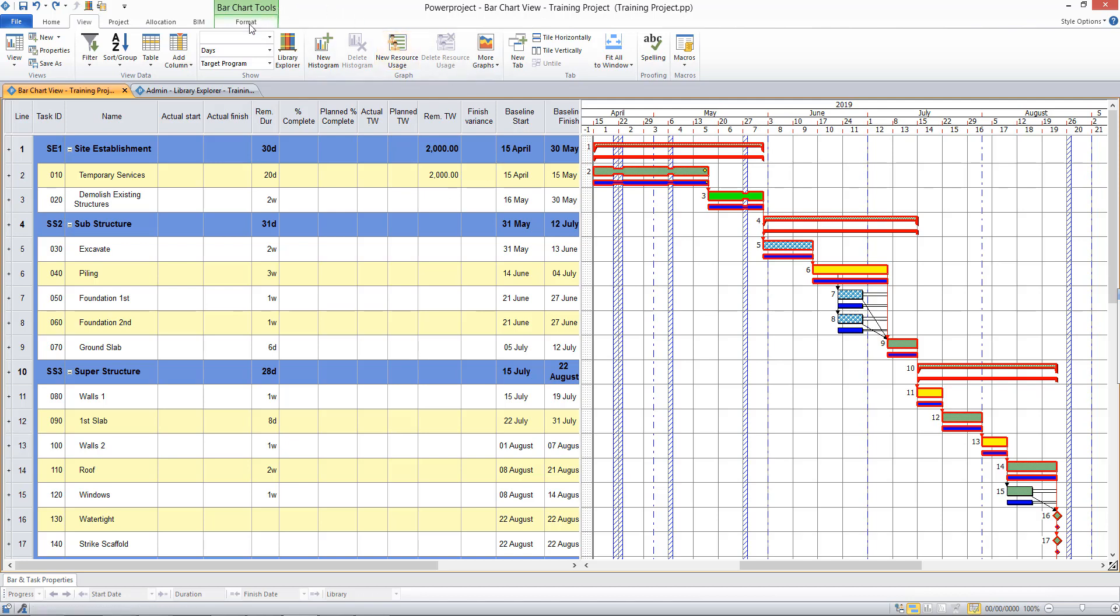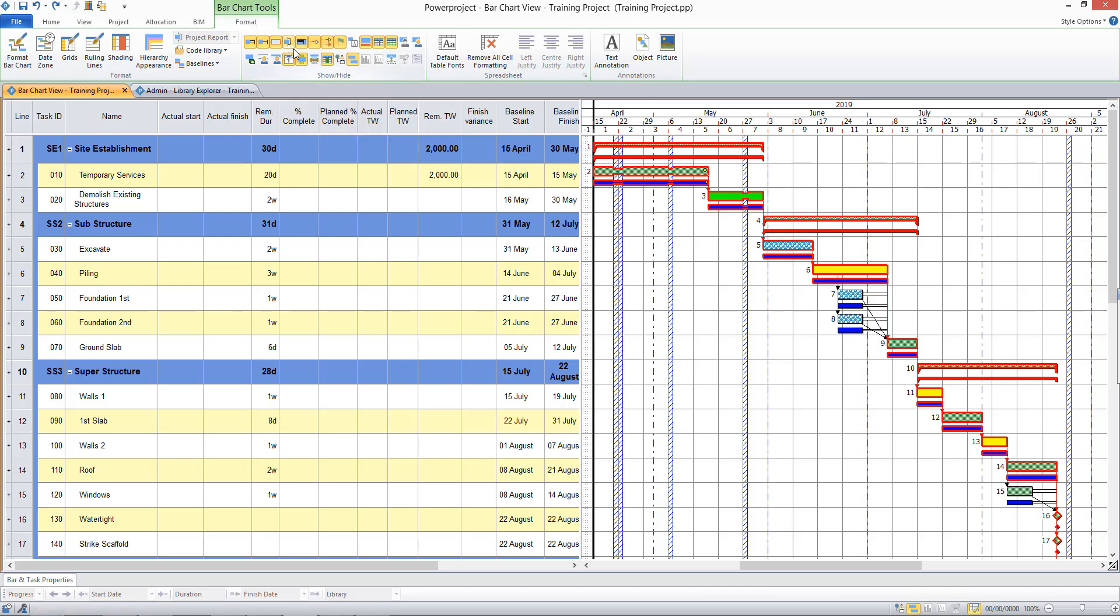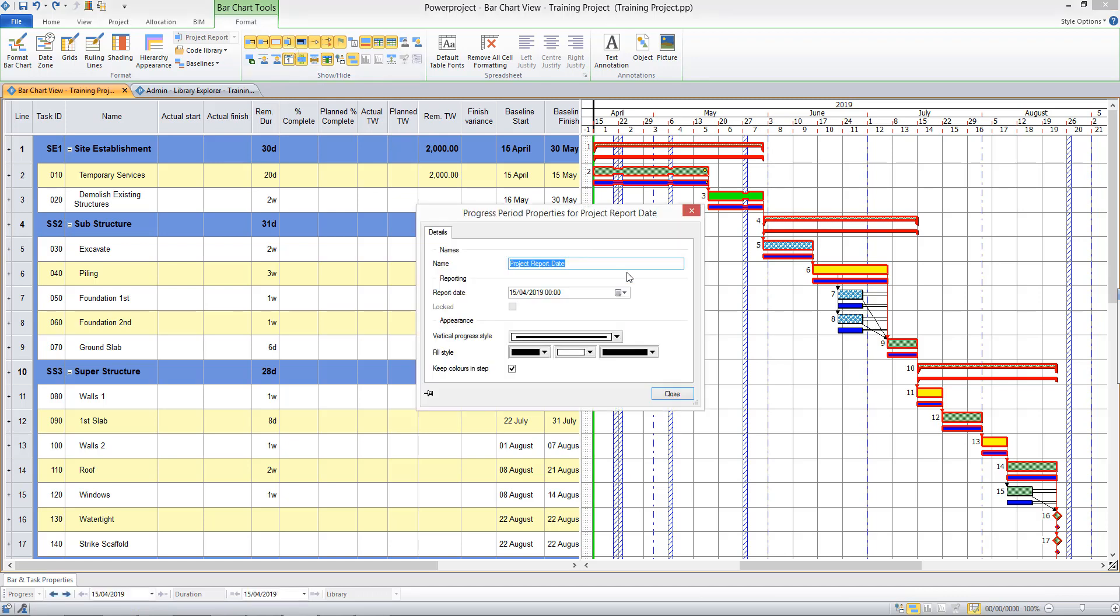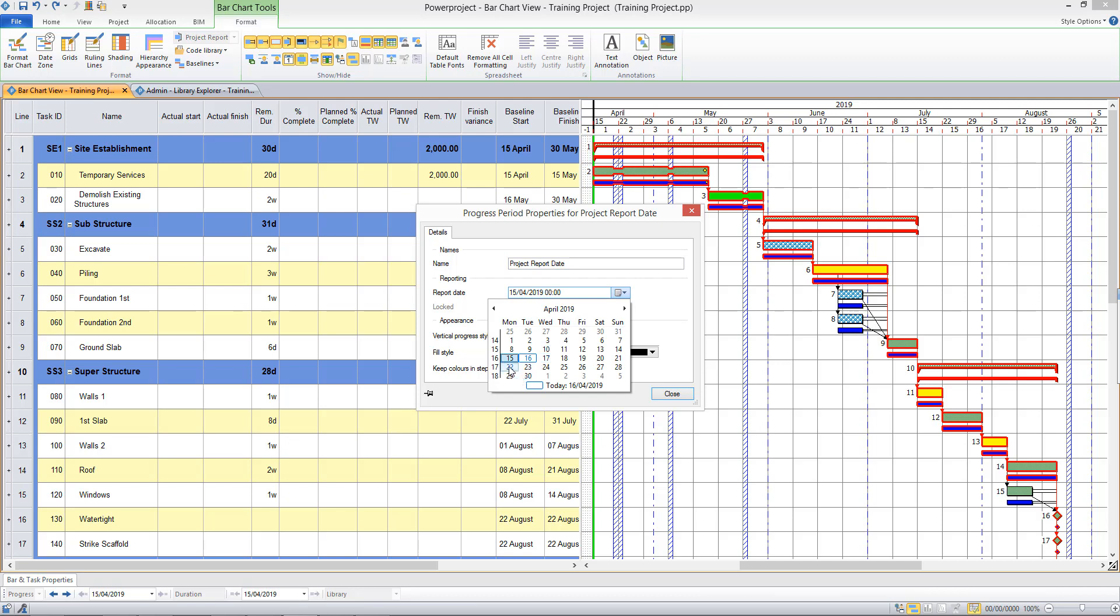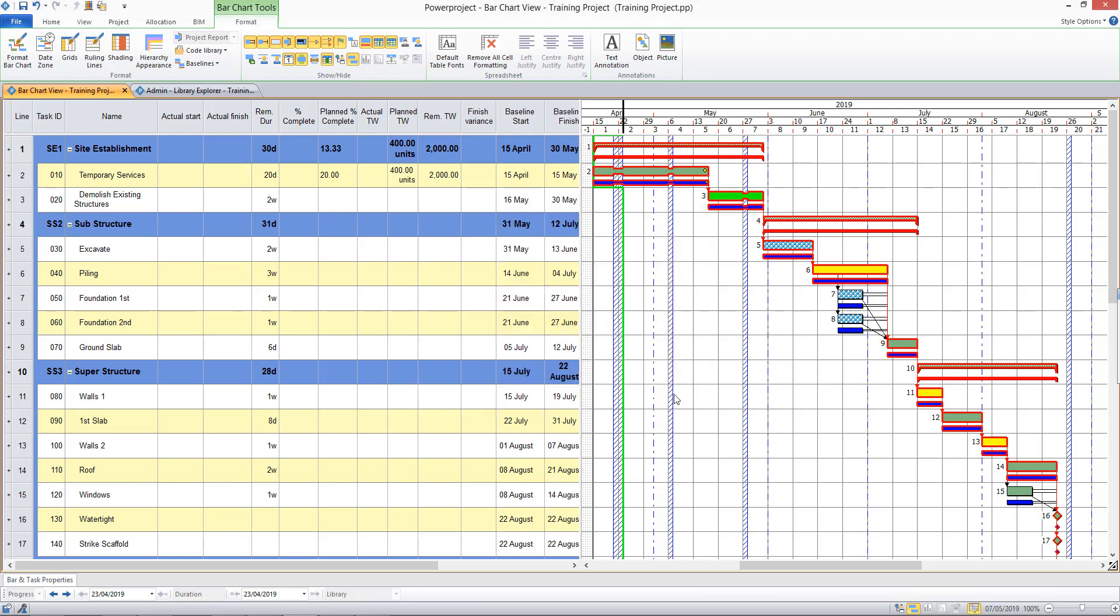Next, I'll want to display a progress line on the bar chart. So come into my Format options, Display a progress line. You can see the progress line here at the start date of the project. I'm going to redate that, so we're one week in. That's actually a holiday, so I'm going to choose the next day along the Tuesday's date there. Okay, so now we see our jagged line. It's jagging to the left because only remaining work stays on the right-hand side of the line.